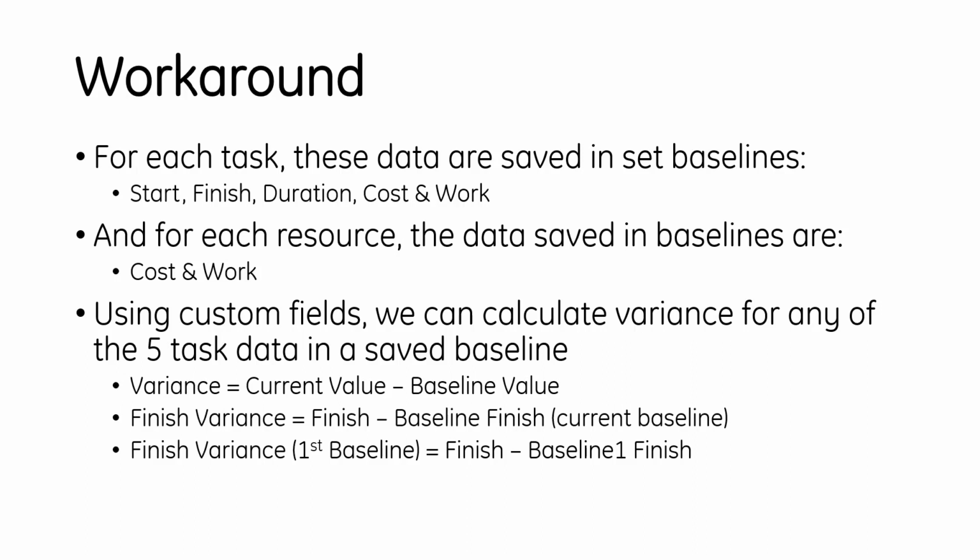And for that, we need a way to access the data that are saved with baselines in Microsoft Project. And I'm aware of a set of 5 fields that are saved with baseline. For each task, you have the start date, the finish date, duration, cost, and work data saved. And for each resource, you have the cost and work data saved.